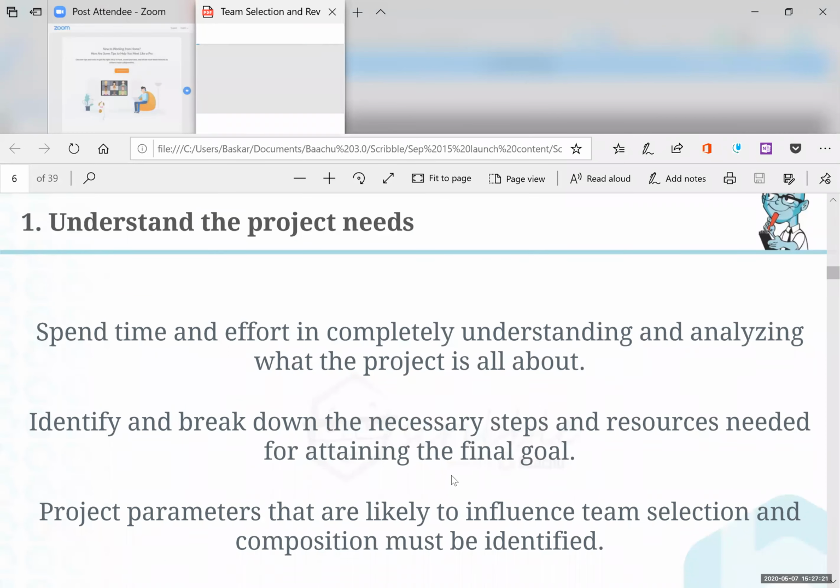Finally, it's not just your project. People talk about lessons learned, but when you're actually running a bid, it's important to develop some sort of mechanism to measure the success of the bid, whether it's successful or not, and your ability to manage the bid. For example, in the project, you might be given a bid cost to manage. You might be given a few external suppliers to manage. So how are you actually utilizing the bid cost, and how successful are you? And can you ask for more? And if somebody tells you we are going to cut 20% of your cost, how good are you at taking the bid forward? So all these things mean there are a lot of feedback mechanisms that you need to set up